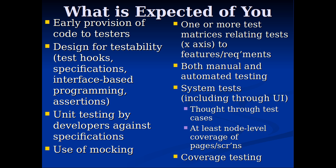There need to be dedicated testers on any given incremental deliverable who are focused on testing. There needs to be provision of that code by a deadline — maybe a code freeze deadline two days ahead of the deliverable, after which that code is provided to testers. Or a midpoint, or some code and then two days before the balance of the code. Designing for testability — we're going to talk about this.